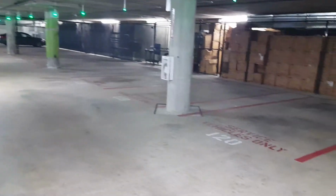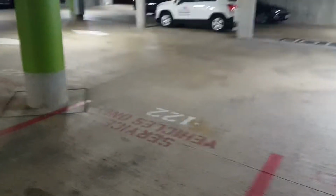I'll give you the quantities on Google Drive. Melanie from Skanska sent me a map with all the quantities and the stalls, so I'll be able to mark it. I just want to give you an idea of what it looks like right now. The stalls are in very well. They're bright, so it's not going to be a quick little one pass and you're done. There might be a couple areas where we have to make a couple passes, but you've got to figure on probably 2 to 3 guys on this.